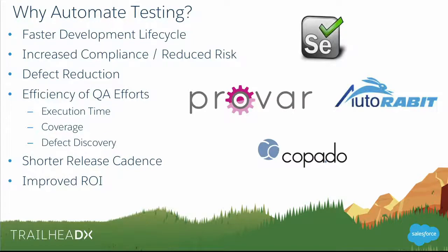But the point that I really want to drive home about test automation is it's the QA lifecycle for organizations, particularly high compliance industry organizations. Oftentimes, what prevents better release velocity and throughput is a bottleneck in the QA lifecycle, right? If you've got a set of elements that you've designed and constructed as part of, let's say, a 2-week sprint, but it takes you 5-6 weeks to get through regression testing, QA, UAT, all of that, it doesn't really help that you can develop faster. The bottleneck still persists further down the development lifecycle.